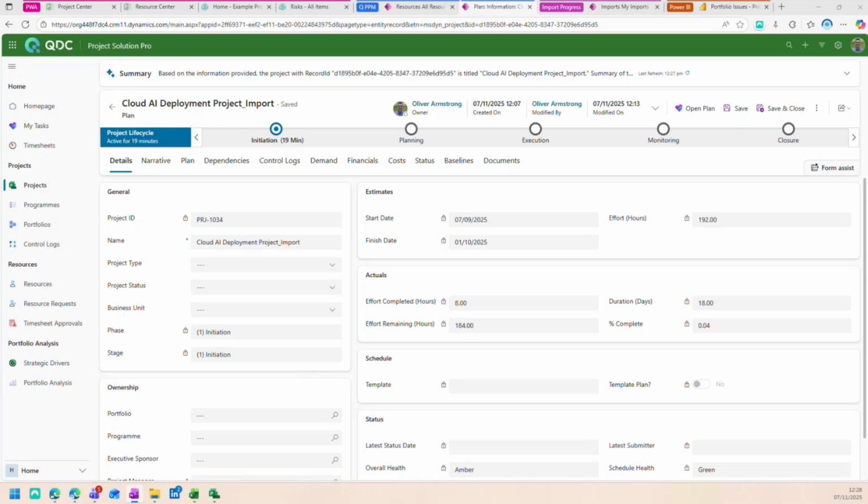Now, given that, there's generally three key options which we see people choose between. Are you going to import absolutely everything and migrate absolutely everything, both historic and current projects and data? Do you just want to migrate current data, so in progress projects, and maybe archive all of your historic project data, still available in reporting, but not bring it into the new system?